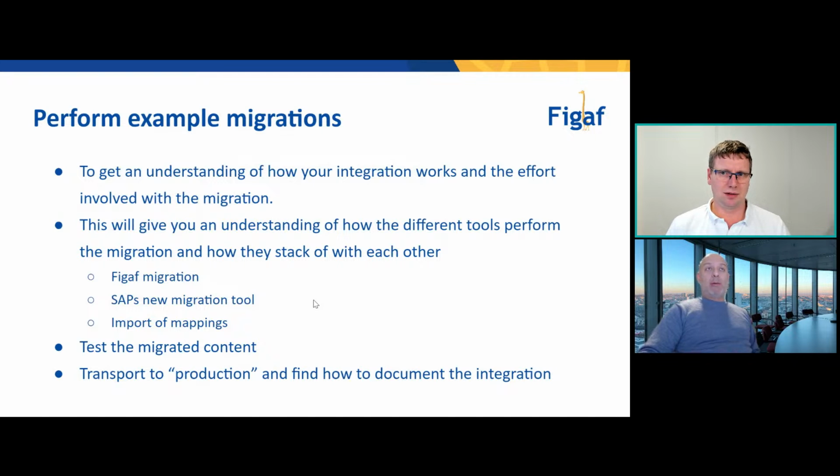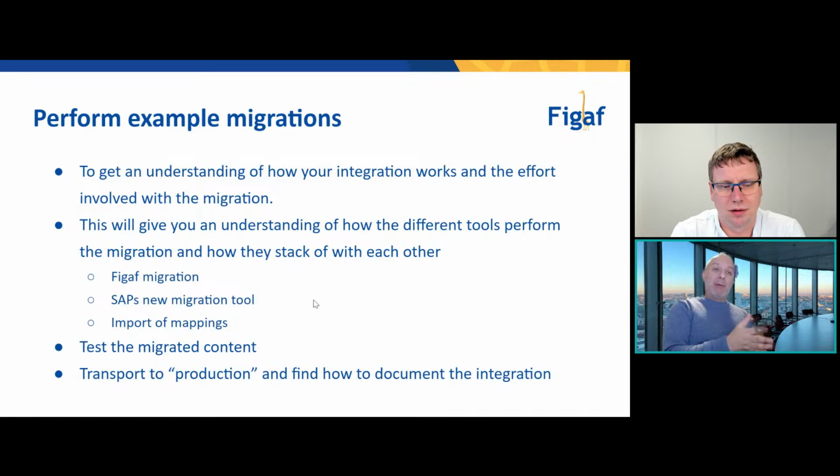A good recommendation is that if you're going to migrate and you already are in the roadmap and have your budgets and plans approved, try to move fast into getting your Integration Suite landscape running with operational interfaces on it. Not necessarily migrated interfaces, but interfaces running on it, because it's going to be very challenging if you start migrating and at the same time building your new processes of operating Integration Suite and learning it at the same time.